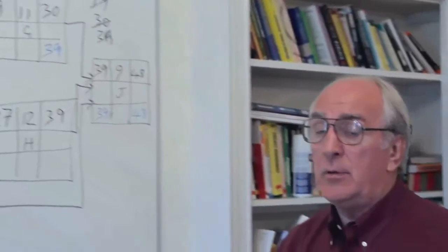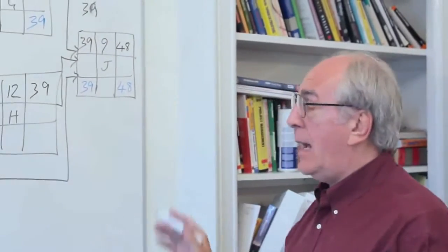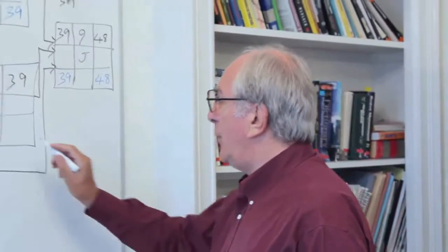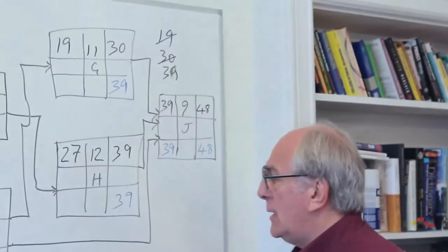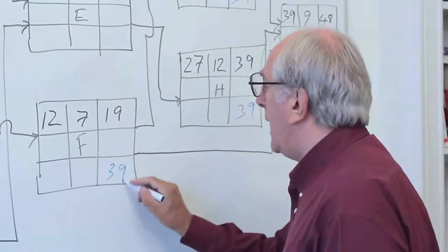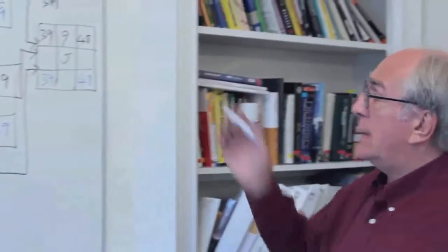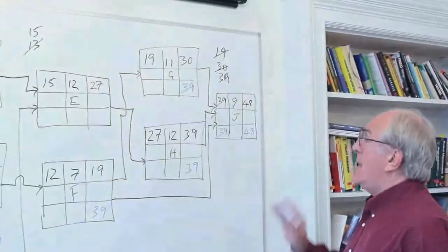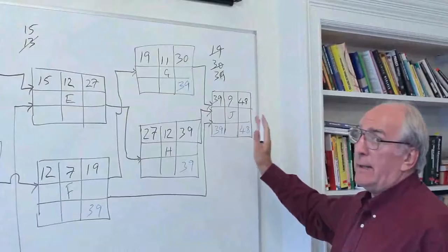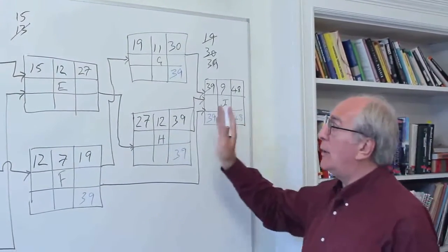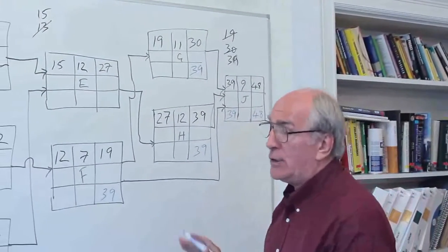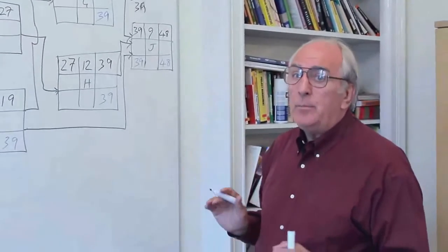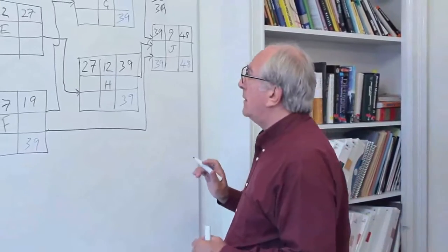Remember, we're talking time units, not days, not weeks. This is an abstract here for you to understand the logic and the timing and the equations. So that 39 operates in activity H, and it also operates in activity F. We look at activity G and say, well, what's the latest time we could start G without affecting the end date of the project? And that's a key assumption. We're now looking at the latest start and latest finishes of these activities to do that without affecting the end time of the project. That's where we're at.